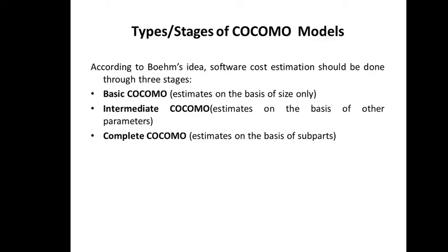It also depends upon the security requirements, like the reliability requirement. If you want to make your software more secure, more effort is required, more time will be required, and in turn more cost will be required. Then the programming capability of the team members: an experienced person will definitely need less effort and less time to make the estimation, while a fresher has to understand each and every minute concept, look at others' work, understand something, and then they can make it.